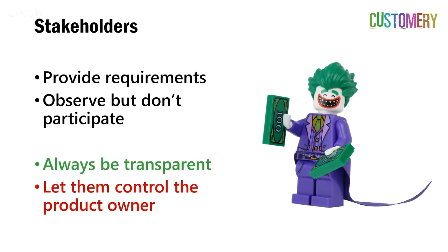What we're trying to avoid there is the last minute crunch that often comes in the development phase of a traditional project where you're way behind schedule and nobody knows until it becomes the start of the testing phase and suddenly only half the features are built and the testing phase gets crunched because we're trying to extend the development phase and we're going to run out of budget.